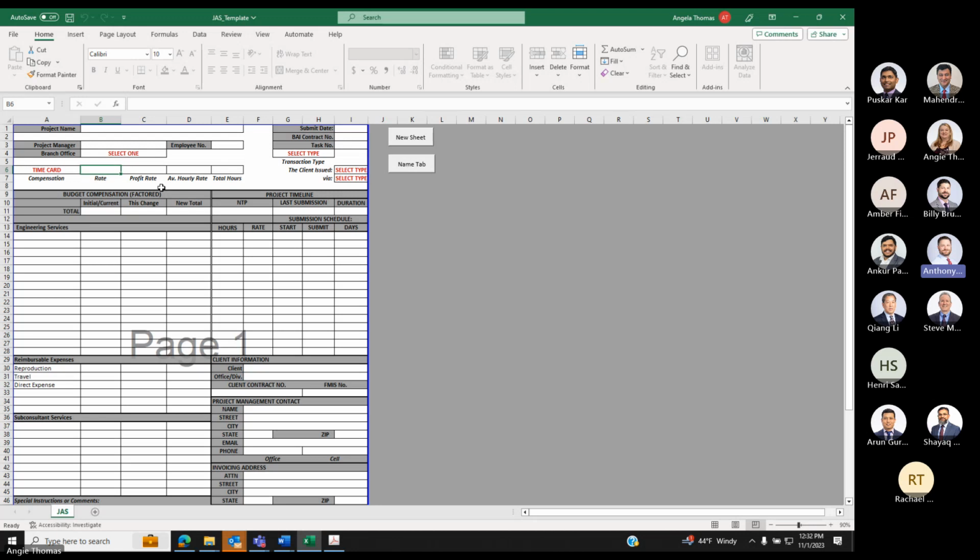It'll usually be a little lower than what we're trying to achieve. By default, we should be doing at least 2.6, 2.7 on all jobs as the multiplier. In certain instances where we're intending to not make a project financially successful, we'll go a little lower to mitigate some of that. But by default, the expectation is about a 2.7 factor at a minimum on those types of jobs.